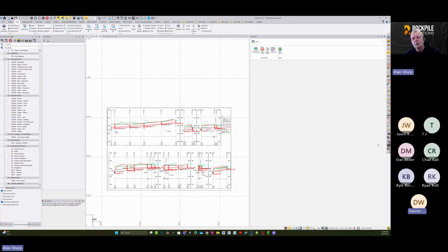Yes, and also with that tool, the smart profile tool, one of the things that we send to the field, our deliverable to the field for storm utilities, say, we always have 25-foot offsets at the flow line elevation, and for instance, on a curb inlet, it would be on the center of the inside front face.